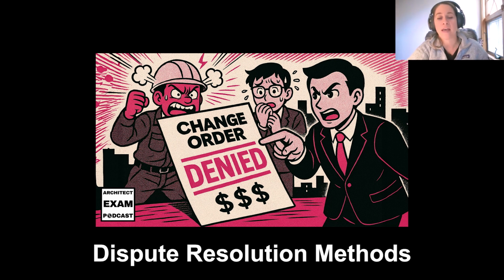But if even a review board fails, you are going to need to escalate the dispute to arbitration, which is the next step. Arbitration is a more formal process where arbitrators will come in and render binding decisions. This is typically specified in the contract or agreed to after a dispute arises. The timeline is usually 6 to 12 months, with costs ranging from $20,000 to $100,000 or more based on how complex the project is. Arbitration has limited appeals compared to litigation and less strict rules around evidence, but it is the next step in the dispute resolution process.